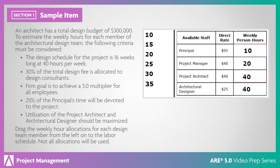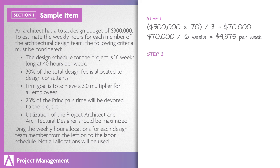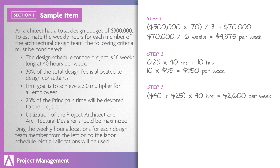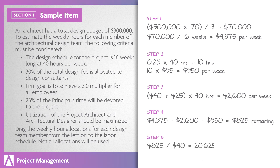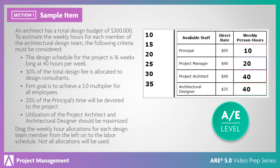The correct answer: in order to determine the number of hours to allocate for each design team member, begin by calculating the weekly direct rate budget and removing 30% for design consultants. This is done by dividing the maximum labor budget with design consultant fees removed by the company multiplier, then dividing by the weeks of the project. Allocate the principal's weekly hours to the project. The utilization rates of both the project architect and the architectural designer are to be maximized, meaning each will allocate 40 hours per week on the project. This will provide the remaining weekly budget to allocate to the project manager. Divide the $825 remaining by the project manager's rate. This is an AE-level item because it requires you to evaluate the design budget, allocations for consultants, and company multiplier in order to determine the appropriate number of hours for each design team member.